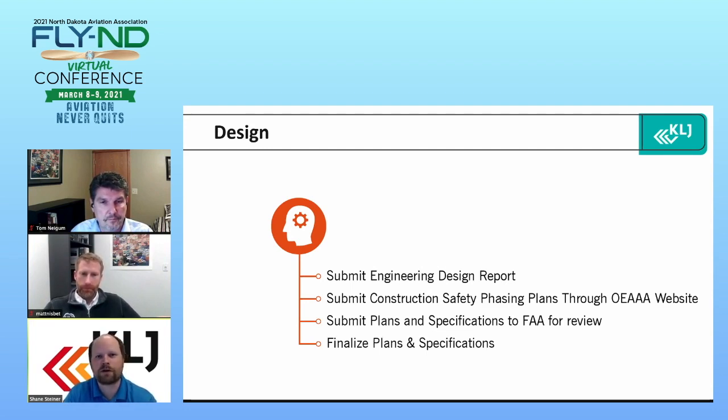As many of you know, it's pretty important that whatever we put on the plans and specs follows the environmental documents that were preceded by that. So keeping up with that same consistency is important as part of that construction safety phasing plan submission as well.